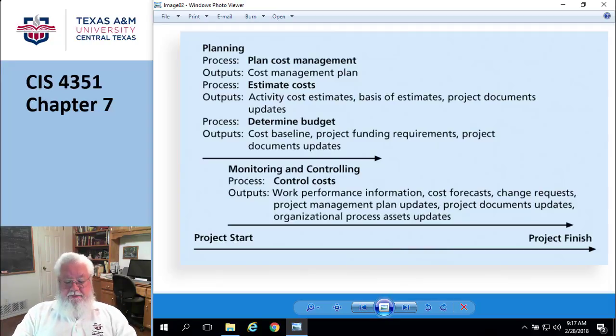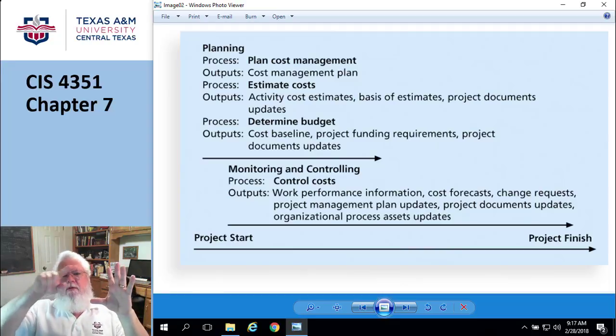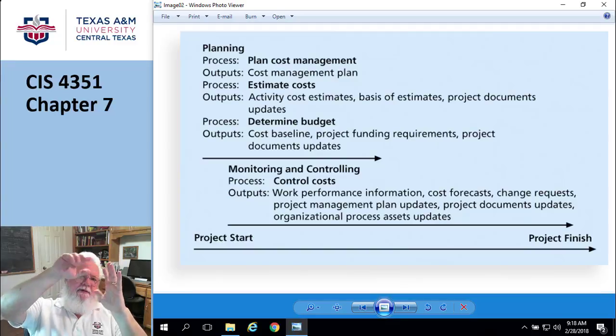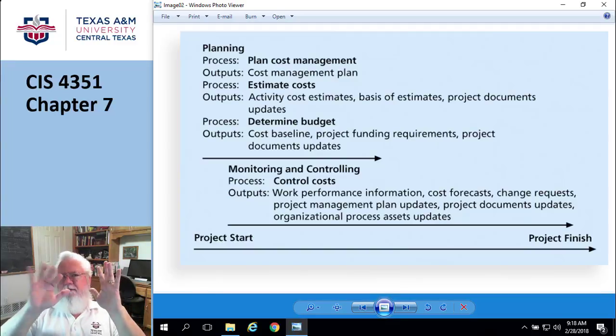So, direct costs are those things that are obviously caused by your project. I have to pay my salary, the salary of my people, plus the things that they consume, right? That's fairly obvious. But what's not so obvious is indirect cost. So, let's say, for example, that my software team is in a big building, okay? And I have 1/4 of the building, the HR and the budget folks and maybe some engineering folks, and the software folks consume 1/4 of the floor plan.